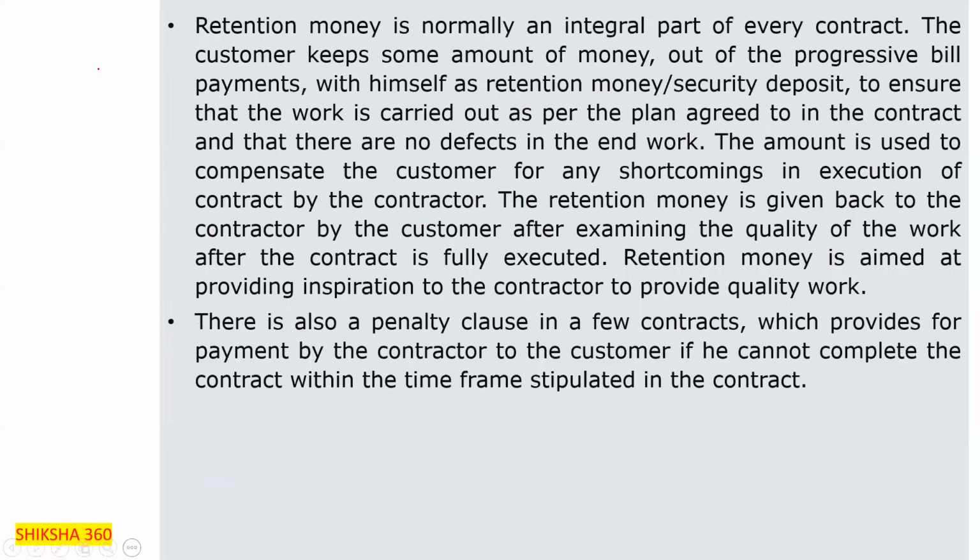Next one is the retention money. So what is that? Retention money is normally an integral part of every contract. The customer keeps some amount of money out of the progressive bill payments with himself as retention money or security deposit, to ensure that the work is carried out as per the plan agreed to in the contract and there are no defects in the end work.